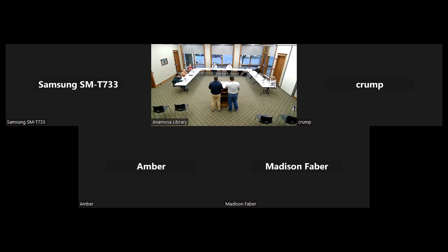In my mind, when you talk about temporary, I thought it was just something interim, maybe to keep things clean. I wasn't thinking it was actually necessary. It was the patch up on Third Street, Third and Lynn, out in the middle of Third Street. When they did stop, the temperatures were getting too cold, so they'd have to haul the bore rigs someplace and keep them inside. Then they'd have the extra cost to put antifreeze in the water solution. So that's why they stopped. Makes sense.